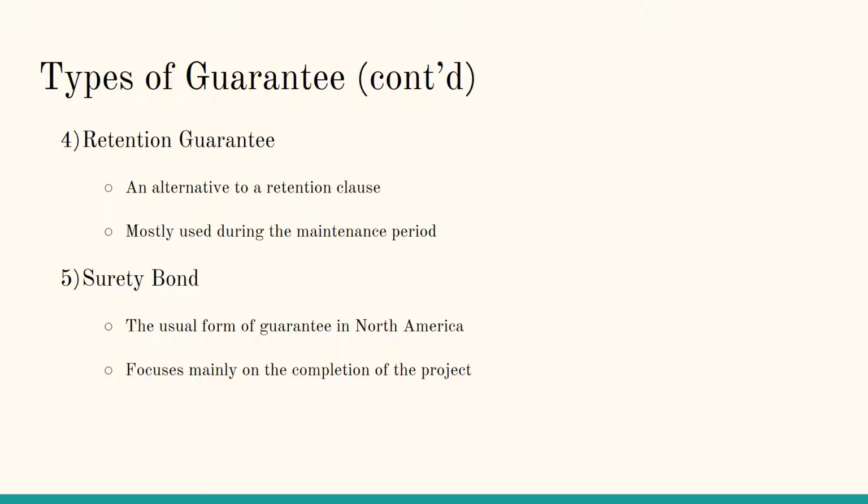Retention guarantee. An alternative to retention clause, as discussed earlier, while the purchaser may consent to this arrangement from the start of the contract, retention guarantees are more commonly used during the maintenance period, that is, upon attaining practical completion.